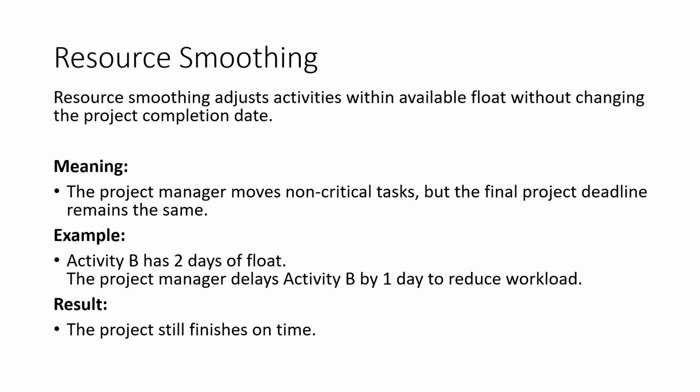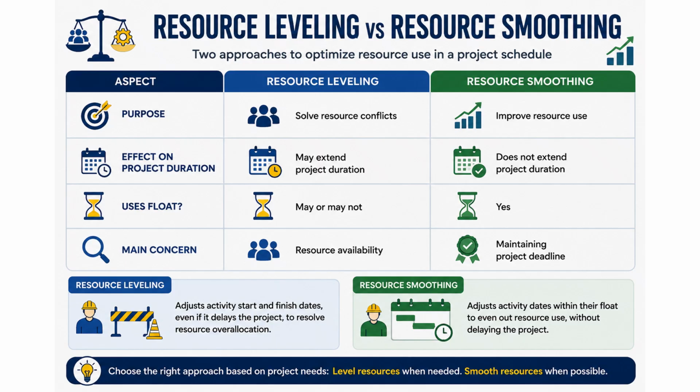Resource smoothing is useful when the project manager wants to balance workload without affecting the project end date. The difference between smoothing and leveling is that smoothing does not delay the whole project, while leveling may extend the project duration. This slide compares resource leveling and resource smoothing.